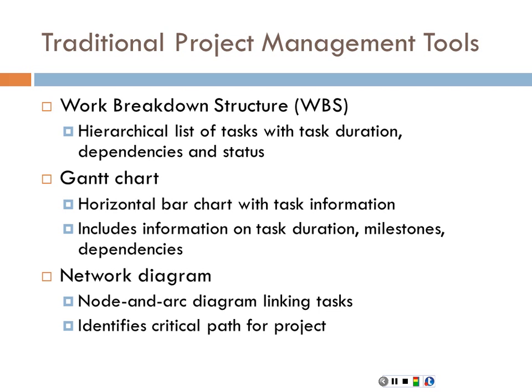So that will require some discussion on your part as a group as to who's responsible for what within that iteration. And so you can outline a Gantt chart or work breakdown structure for each iteration. Right, so when you look at iteration 2 and the deliverables for that, you can outline the core tasks or visual representation of that for that iteration as well.